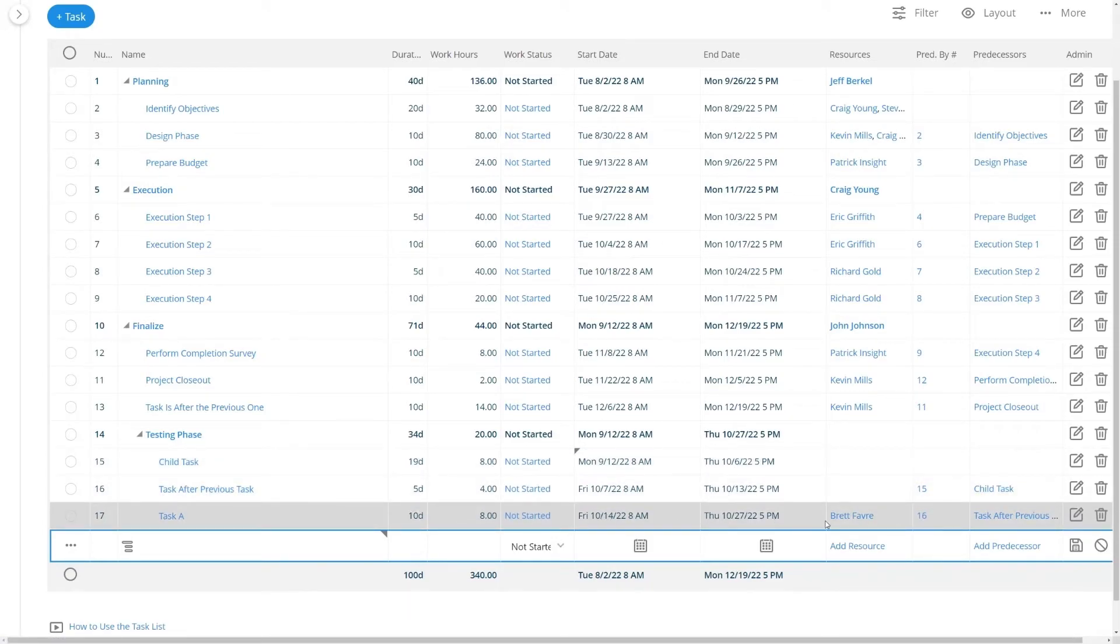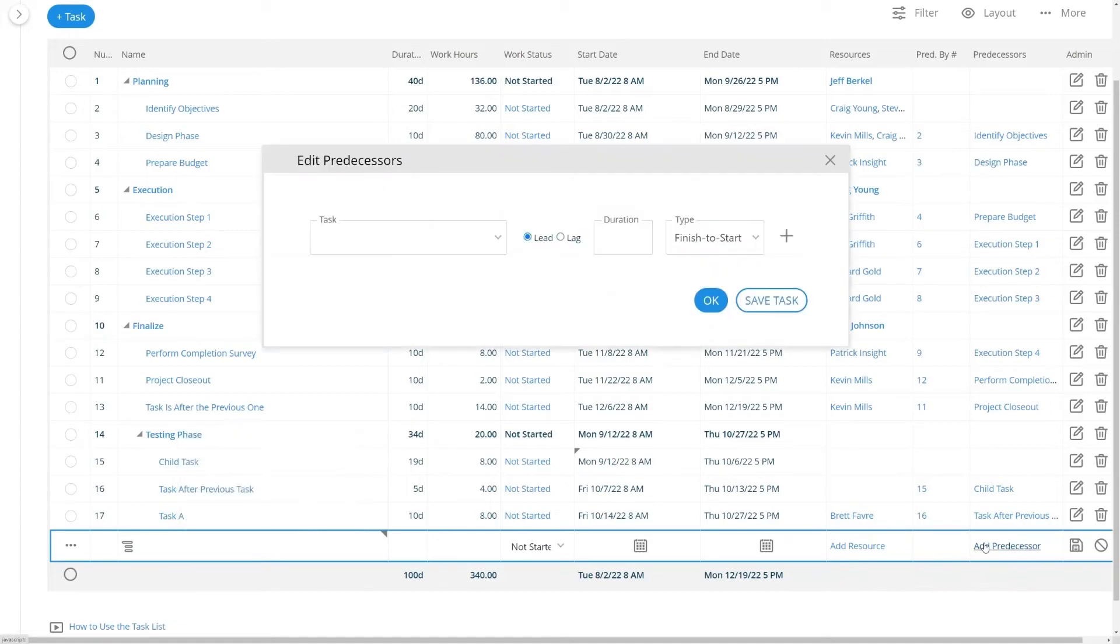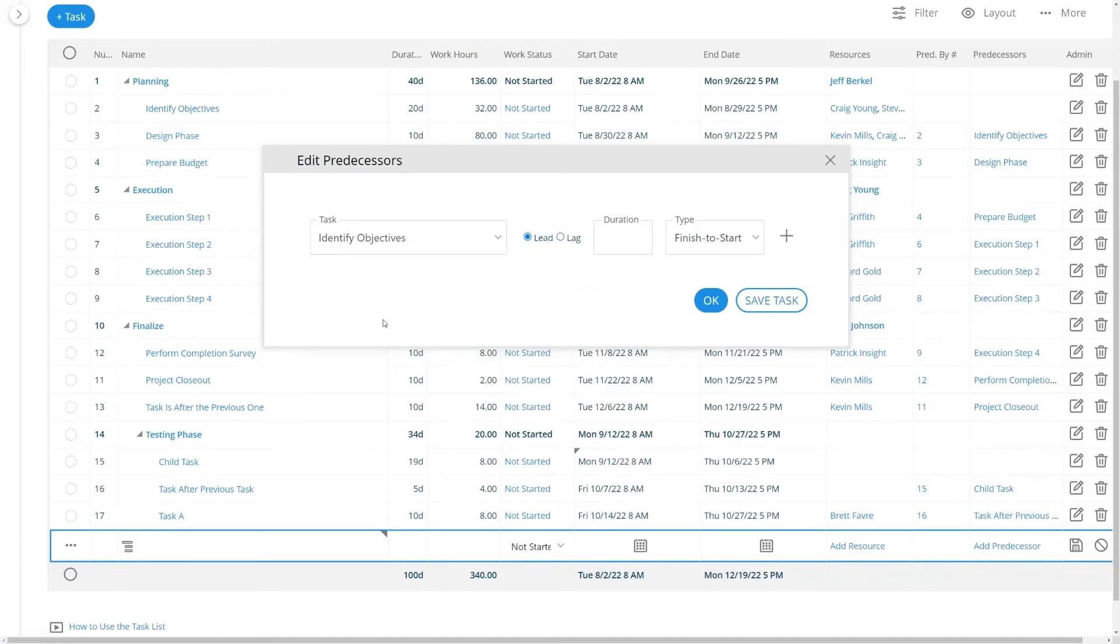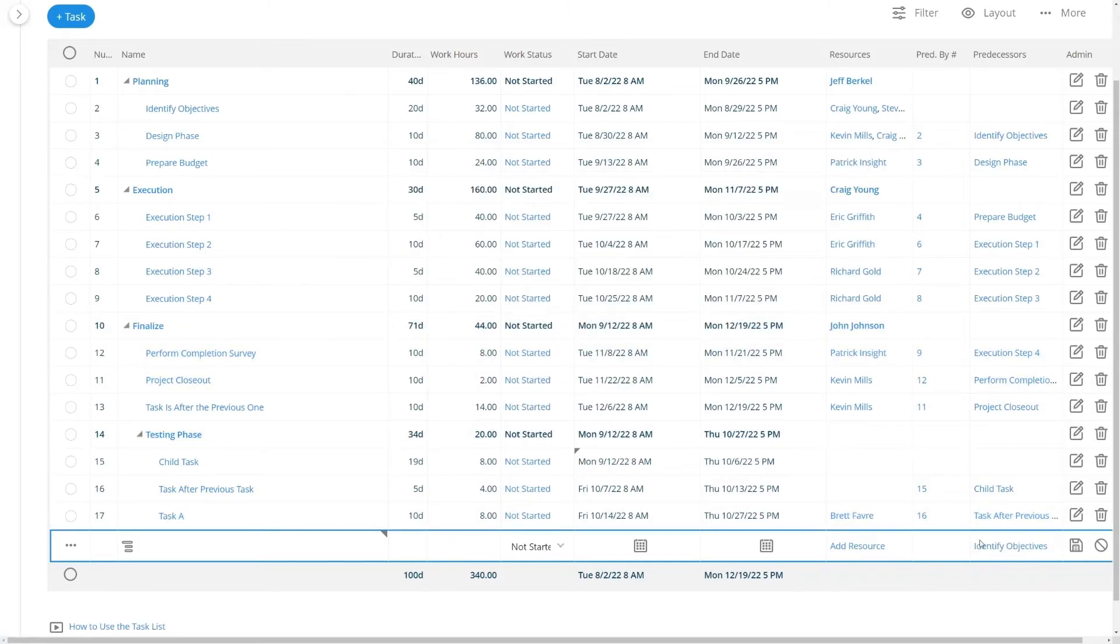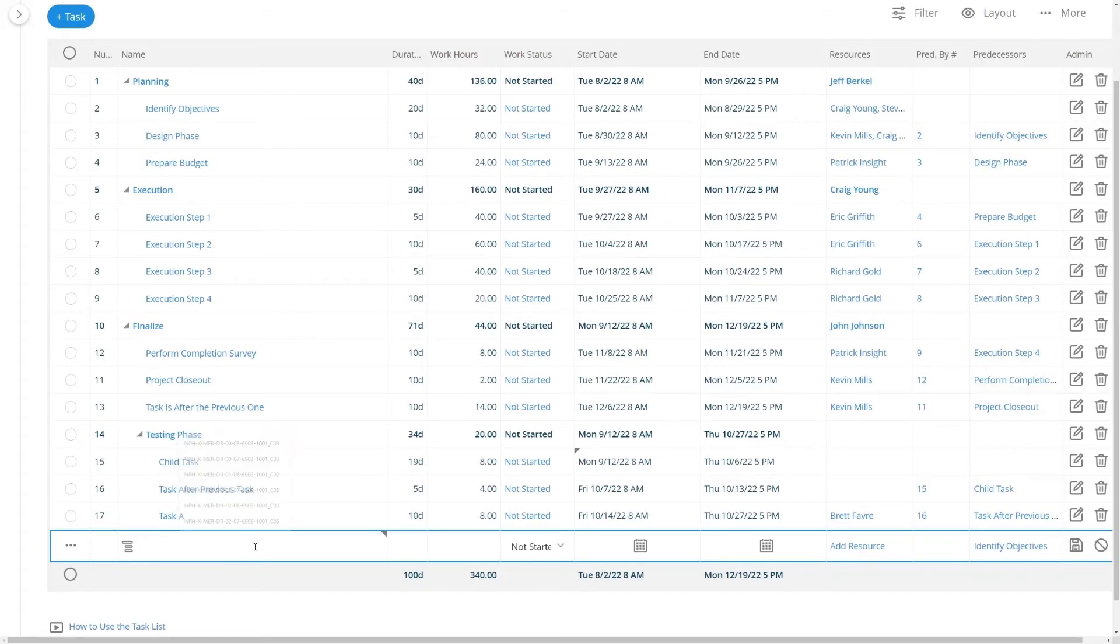One more thing on the task list to help you get started is you can also add predecessors through a graphical interface. Simply select it, click OK and now identify objectives is the predecessor here. I can add the name of my task. Whatever your task is you should name it. Like if you're going to build some software you'll do that here.